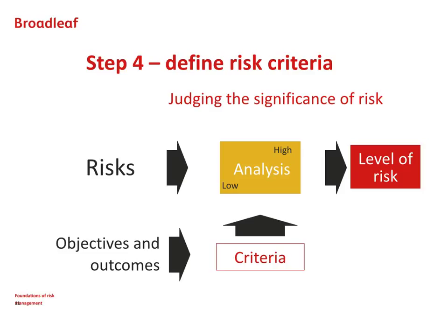Step 5 of the process involves thinking about our risk criteria. These are the rules that we have in place in our organisation by which we judge the significance of the risks we discover. We use these criteria in the risk analysis or understanding risk step of the process, and we obtain those risk criteria by looking at our high-level purposes and their outcomes and expressing those in terms of scales and limits.